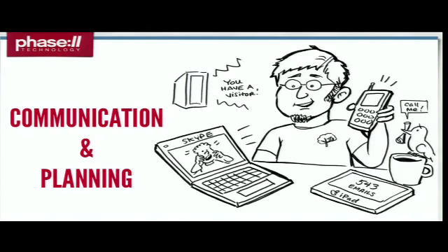It's also incredibly important that you don't rely on email. Everybody gets too much email. It's a really bad habit to have anything about a project at all done via email. If you have to send an email about something, you should be referencing a link in a wiki or in a communications portal, or something like that, where you have a canonical place that everyone can reference for that piece of information.